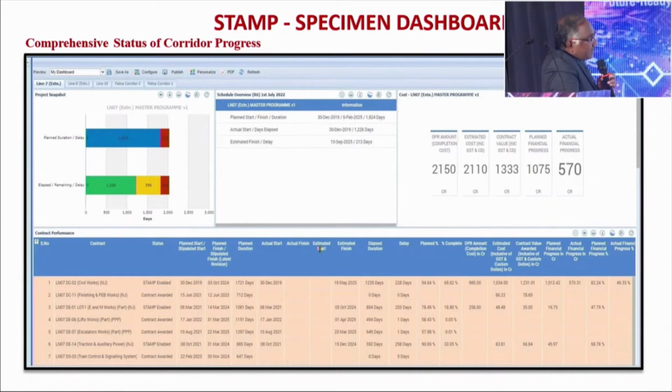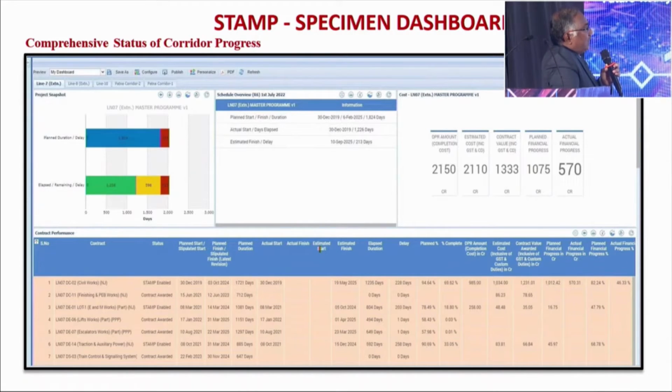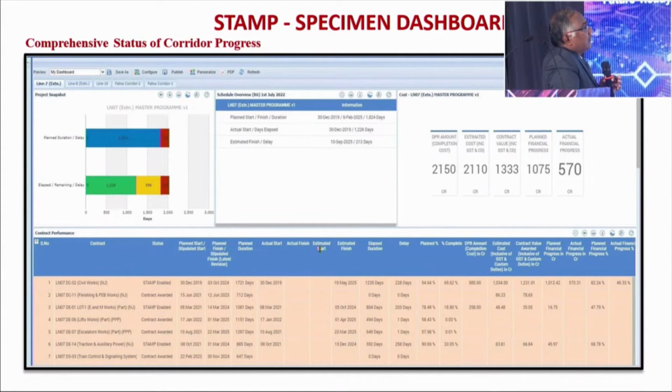date. Actually, this scheduling is done on a weekly basis for every DW, Primavera schedule. That is done every Sunday late night and early Monday morning, so that from Monday onwards you will be able to know up to the last week. What exactly is on your S-curves? Basically, on a real-time basis it comes to the dashboards. But the estimated finish and all will be calculated every week, and your S-curves will be reflected on a weekly basis.